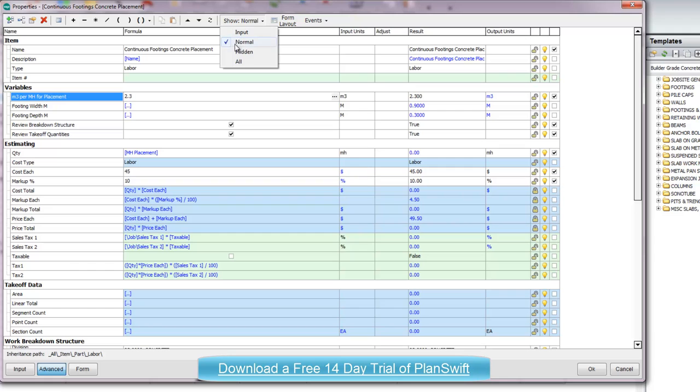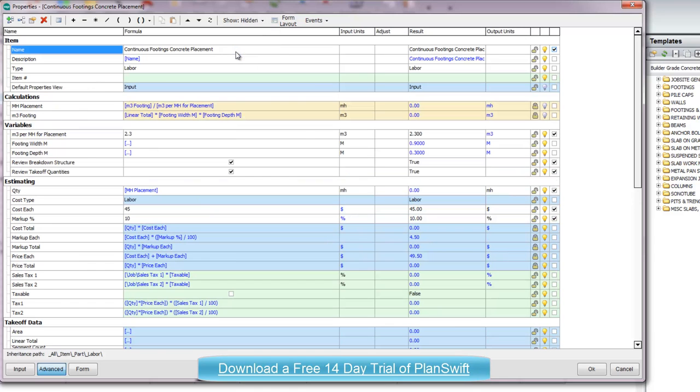If I go to the calculations again, here is the calculation for the footing one more time, and it's a neat calculation. I don't need the additional add percent because this is a placement of the concrete, not the purchase. And here is the man hours for placement, which is the neat calculation for the concrete divided by the productivity that you have.